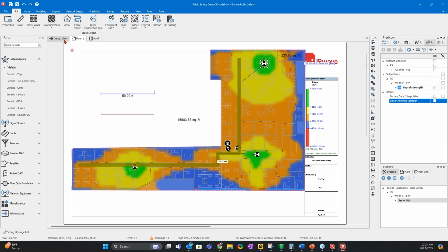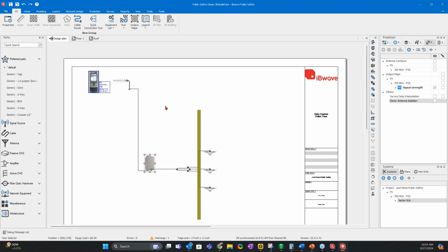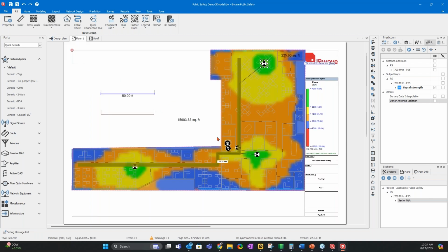So now you know what the downlink value is. So you tell your commissioning engineer, make sure the downlink is not more than 43. Another trick is to move the antennas further away from the walls up there to get a better reading.